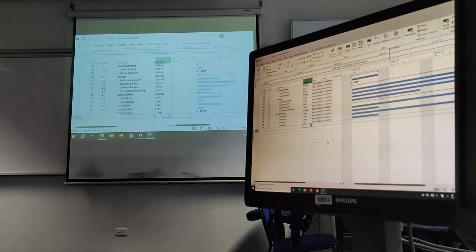Okay, so what we're doing now is we are going to put in the... So you notice that what we've got here is we've got 15 days plus... I just put in weeks. So we've got a long weekage, but the summary only recognises that. So what the summary is saying is those tasks are all happening together. Over that period of time, those are all going to happen together, but we know that they're not because they're going to end up in a sequence. So now we need to put in the predecessors and successors.